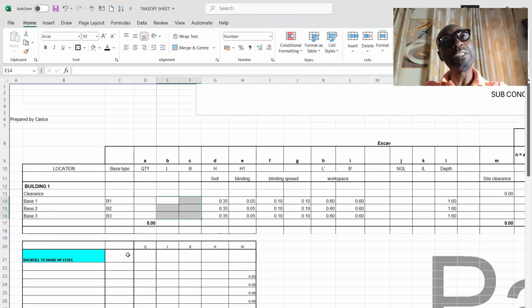If your bill of quantities is linked to your build-up rate, and your build-up rate is linked with the schedule of basic rate, then once the schedule of basic rate is updated, in the space of 2 days you'll be able to prepare a bill and hand it over to the client and collect your money, rather than spending weeks trying to do something that you can actually do in 2 days with the help of Excel.